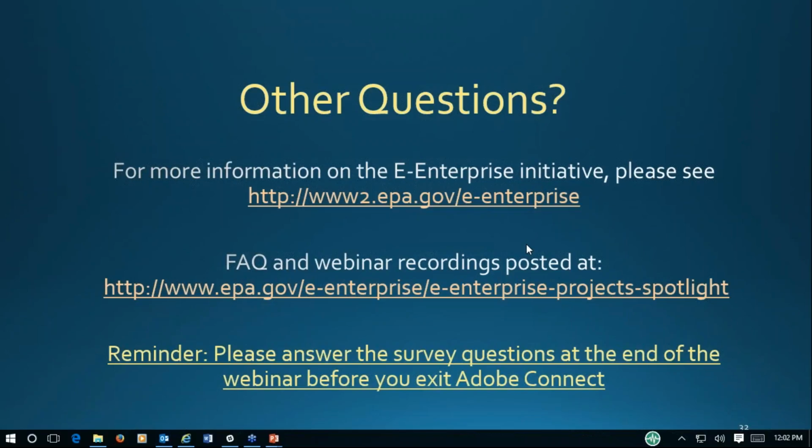The second question is, will the PDT, the product development team of the CARE implementation approach that we've talked about, act as the product owner and work on grooming the product backlog, or are they considered stakeholders with one representative acting as the overall product owner? And the answer to that is yes. One of the jobs of the product development team is to work on grooming the product backlog. We're calling it a priority list, and then setting the priorities for subsequent phases of the work.